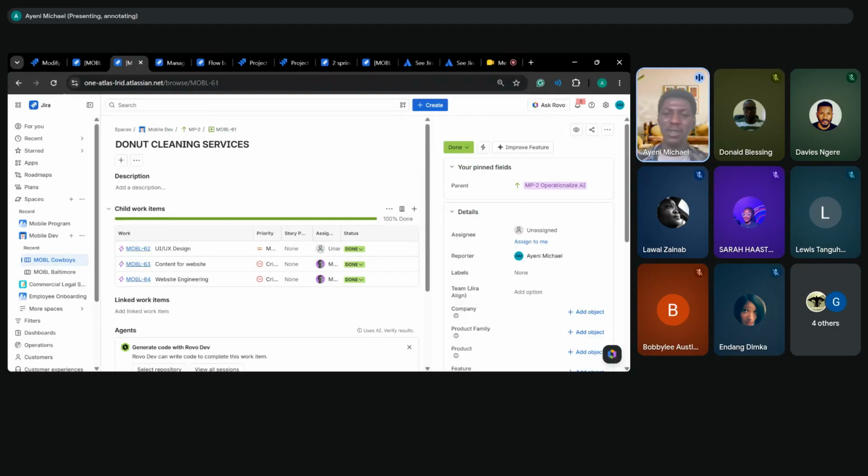So bringing them into Jira service management, every customer became an organization within a single project. So what they created 7 projects for is just one organization. All their customers in a single project. Bye-bye 1,000 projects. Now they only have just one project for managing their customers and another single project for managing internal work. That was the end of it. 2 major projects from about 1,000. So again, it goes to how our work is architected. Does that answer your question? And I went a little bit long.